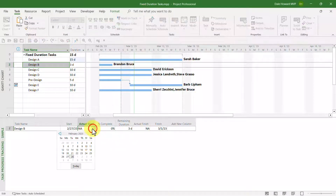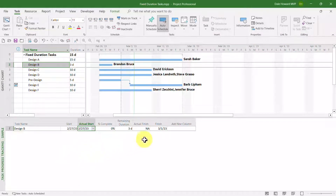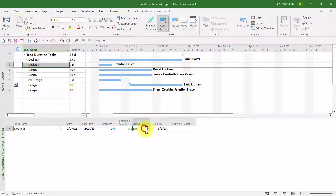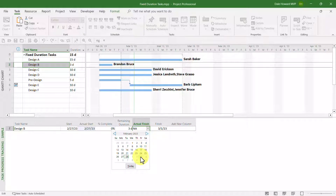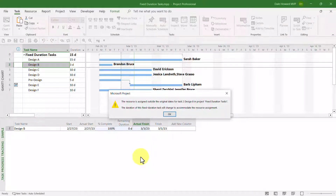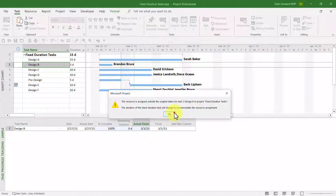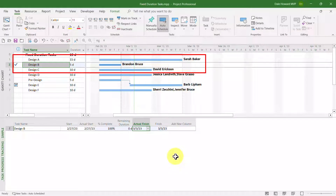For this task, the team member assigned did start on the 27th as planned, but he reported an actual finish date that is two days later — not March 1st, but March 3rd. When I enter that actual finish date, Microsoft Project displays the warning dialog that the duration will change. When I click OK, the duration of this fixed duration task has changed from three days to five days.